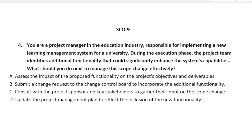This is where we left off. It reads: you are a project manager in the education industry responsible for implementing a new learning management system for a university. During the execution phase, the project team identifies additional functionality that could significantly enhance the team's capabilities. What should you do next to manage this scope change effectively? A: assess the impact of the proposed functionality on the project's objectives and deliverables. B: submit a change request to the change control board to incorporate the additional functionality. C: consult with the project sponsor and key stakeholders to gather their input on the scope change. D: update the project management plan to reflect the inclusion of the new functionality.